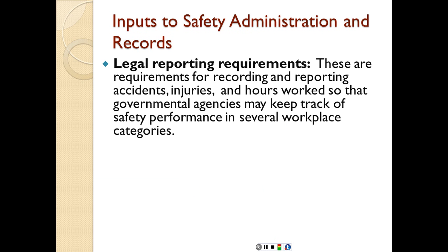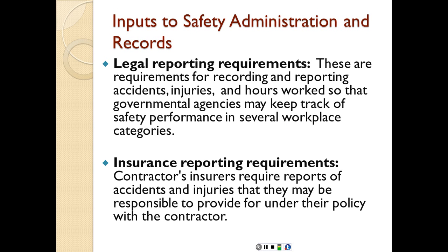The legal reporting requirements, these are requirements for recording and reporting accidents, injuries, and hours worked so that governmental agencies may keep track of safety performance in several workplace categories. The insurance reporting requirements, contractors' insurers require reports of accidents and injuries that they may be responsible to provide for under their policy with the contractor.